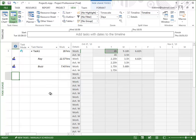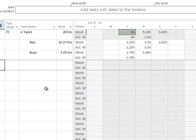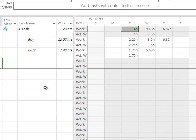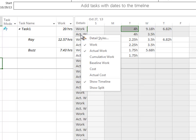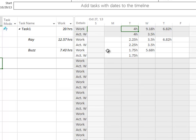And that switches us to a completely different mode in Microsoft Project. We see the task assigned to two different users, and we see some work that is assigned to those people. Now I've actually right-clicked in here and chosen actual work to show the actual work row for each of these. This will show the actual hours that were sent over from Standard Time.